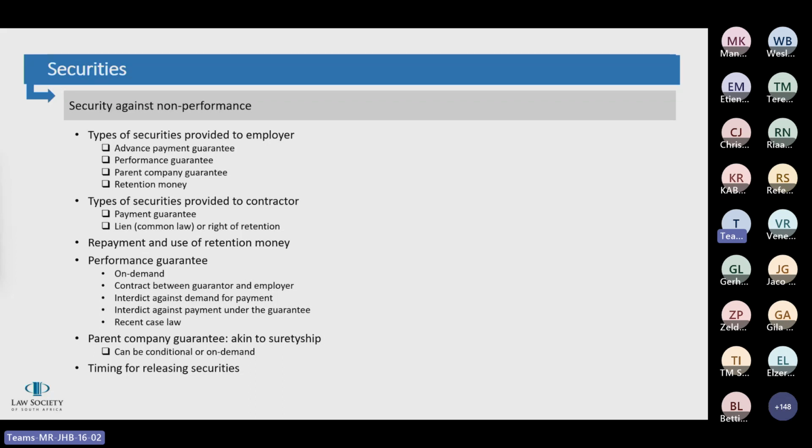So often in the interdict proceedings, the contractor as an applicant would raise facts of contractual disputes between it and the beneficiary, being the employer, in terms of the underlying construction contract in an attempt to show fraud by the beneficiary. The courts are, however, very clear that they will not investigate underlying contractual disputes between the parties in ascertaining whether or not a guarantor should pay out. It will look at the explicit terms of the guarantee and ascertain whether, under such terms, fraud can be proven. For example, that the beneficiary was not entitled to assert the essential prerequisite under the guarantee, viz.